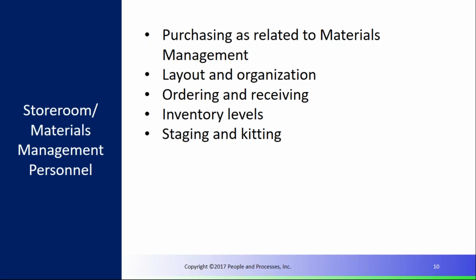the staging and kitting. Ideally, if you think about this, this is a function that we would prefer the stockroom do. And the reason is they're the ones that handle the materials, they're the ones that purchase the materials, they receive the materials. So wouldn't it be great, can you imagine if you had a space in the stockroom, because the stockroom's already secure, where you're staging and kitting those, and as those parts come in, they get put into a kit. Those kits, once they're finished, you have a pick list inside the kit, and you highlight across the pick list. Once the items are there, you change the status to schedule ready. And in some cases, some organizations, the stockroom people actually deliver the kits out in advance of the schedule.